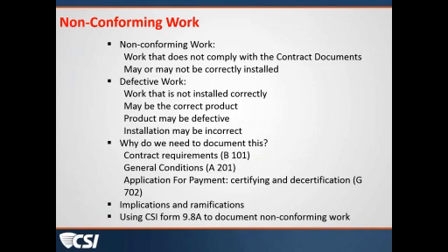It's not only in the general conditions, it's also in your contract with the owner. It's a contract requirement for you to inform the owner of any non-complying work. So if you fail to do so, you are in breach of your contract.